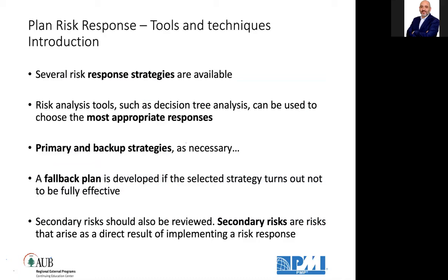Risk analysis tools, such as decision tree analysis, can be used to choose the most appropriate response. Shall we prototype? This is a response. Prototyping is a proactive response to reduce risks, right? Primary and backup strategies are also necessary, and a fallback plan is developed if the strategy turns out not to be fully effective. What are secondary risks? Secondary risks are introduced as a result of implementing a risk strategy.